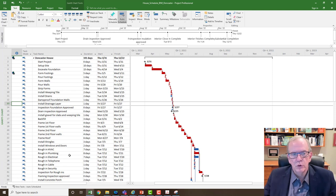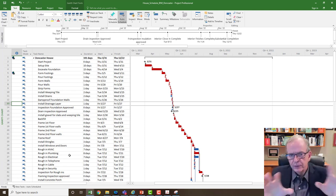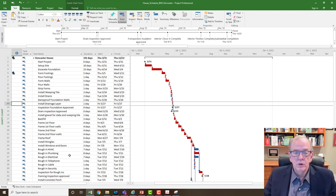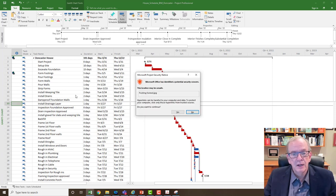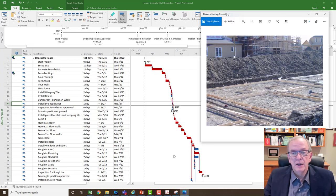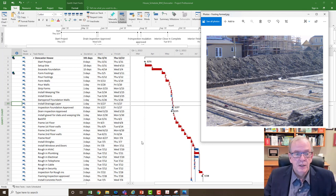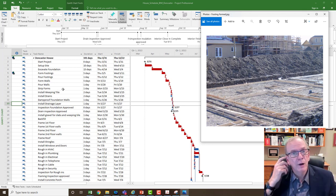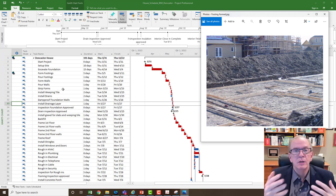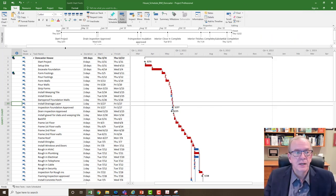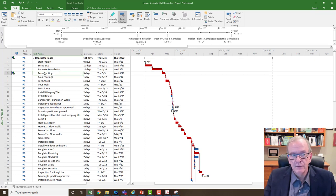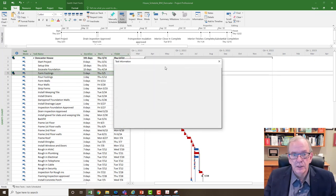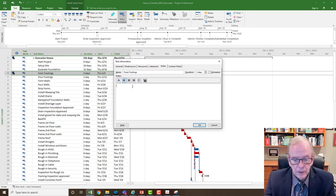So it can be a very quick reference tool, especially if you're going to be going back and forth with certain things or you want to have it built into this. Even when you complete the project and you've got these hyperlinks to various photographs that you took, it can be a great as-built document to help you plan the next house. And you could even have notes that would reference and explain what happened on this particular activity by double-clicking on the activity and putting a note.